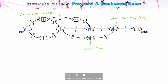You must manually calculate slack times as you go. For this node, we can start the task as late as 12 without any delay, because as long as it's done by 16 we're fine. Then working back further, Task A must be started right on time, otherwise the whole project is delayed. A good way to double-check your work is to make sure you end up at double zero when you arrive back at the start — if you've done it correctly, you should always reach zero zero. We've now completed the forward and backward scan.